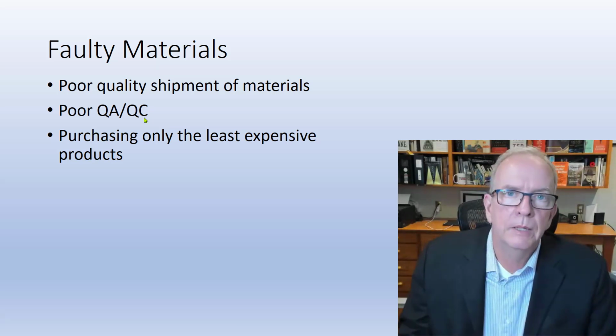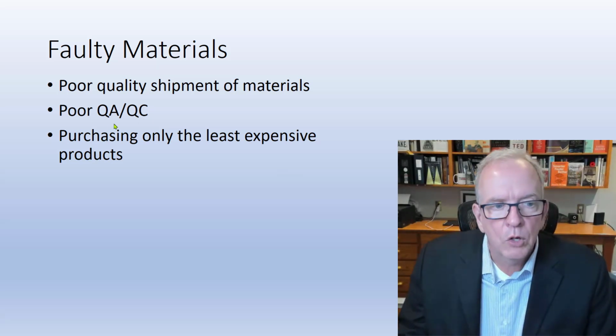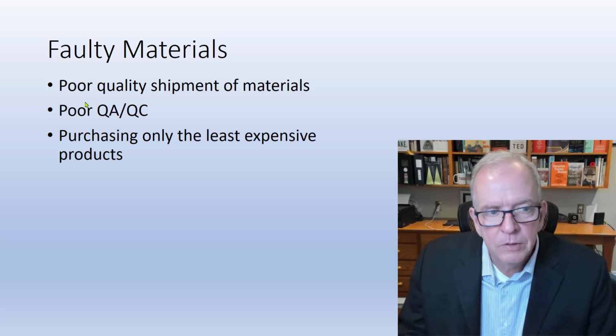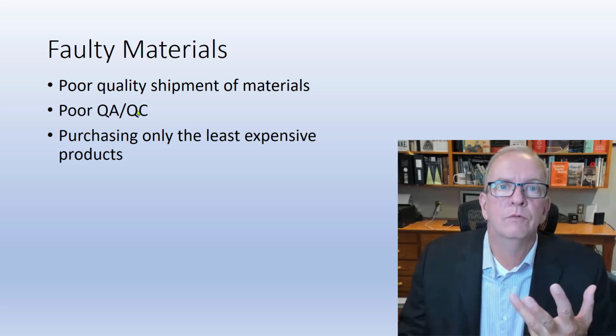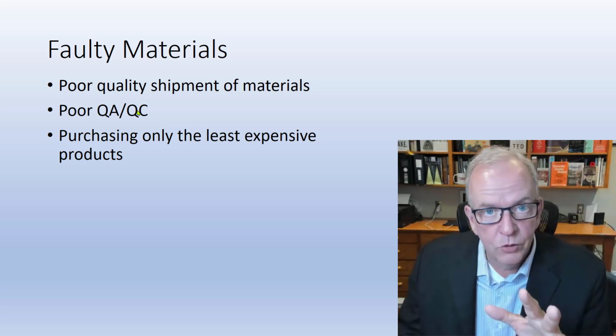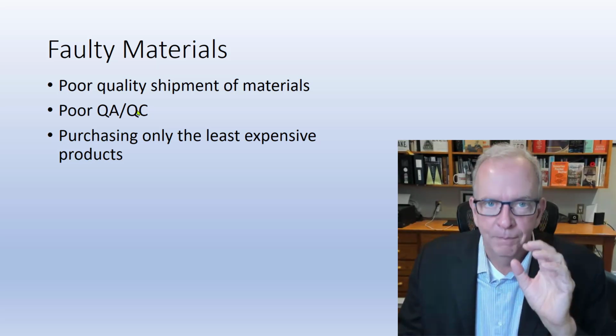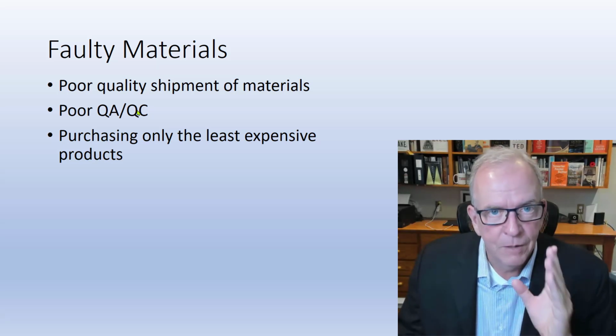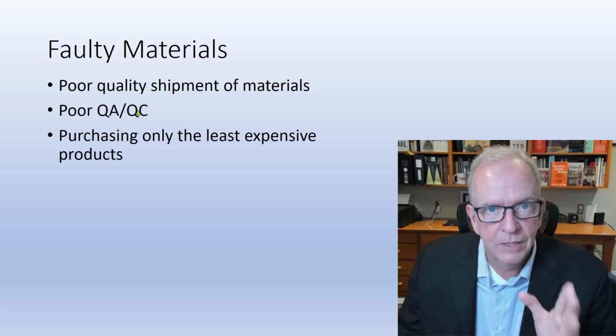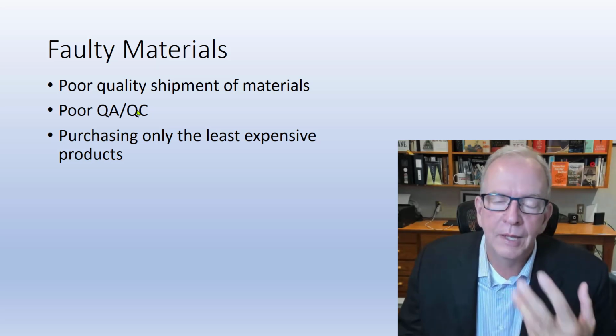That's what's really important. And so you can really look at your quality assurance. How are you setting up your systems to make sure that quality is there? And then how are you checking it to make sure that what system you have in place is actually working, and to minimize the amount of rework. In construction, the sooner you find something, the better it is. I'll repeat it. The sooner you find it, the better it is. Prevention is the best, all right? But the sooner you find it, then there's less to redo.